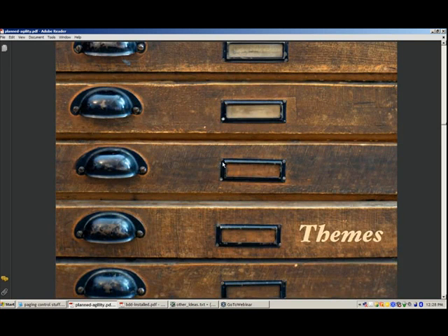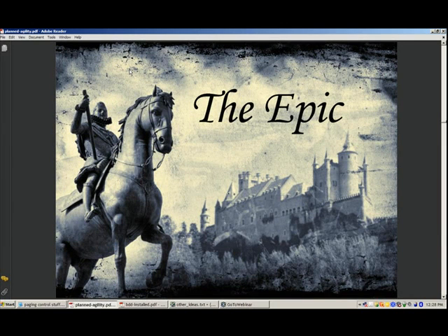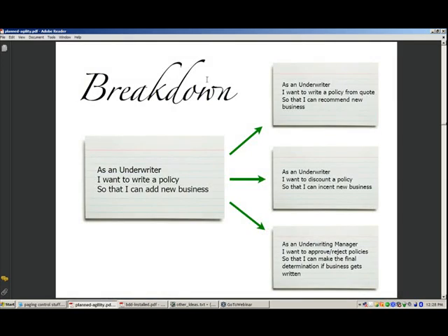All right. Now, one thing I'll just say, sharing some of the techniques that we use here: our product owners use epics to manage the large feature areas in the system. Obviously we use the VersionOne product in-house, and there's a way to manage that, and they can see how we're progressing along in the epic via what's called a parking lot chart, progress meter, that kind of thing. So epics are a valuable tool. You just don't want to see them in your iteration.